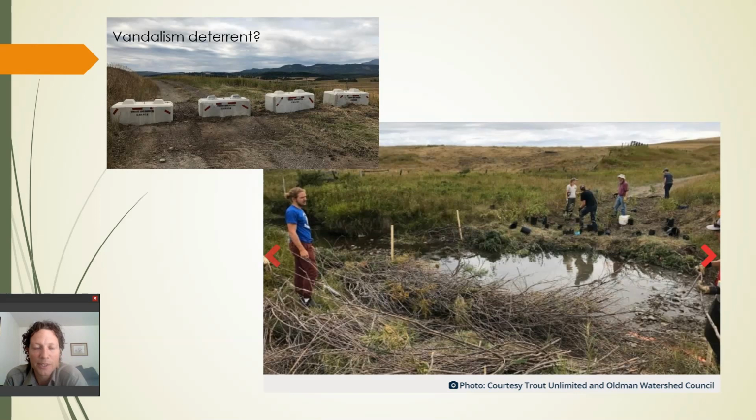Retiring the road entirely or putting in big tank traps or some other method of controlling access to the site, although it would have been more expensive and time consuming, would have been a better protective measure for their investment. So sadly, this kind of thing does happen, and it's hard to understand. That's why it's important to identify your risks and your threats early on.